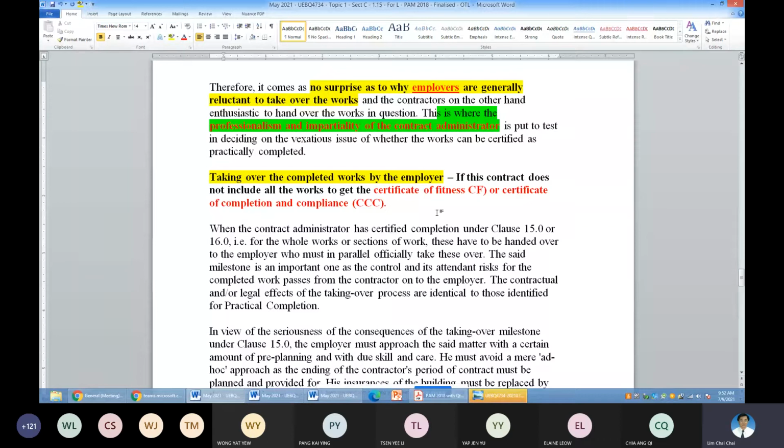If that is included, then it is something so-called reasonable. Okay, but it doesn't only complete the building only. The roads, the drainage, the sewerage, the electrical connection, water connection is not given to the contractor. Then there's one special clause: I won't give you the CPC until you get all the CCC done. So it's really horrible. Okay, so please remember that when you go out to work, I can assure you this clause is going to be there.